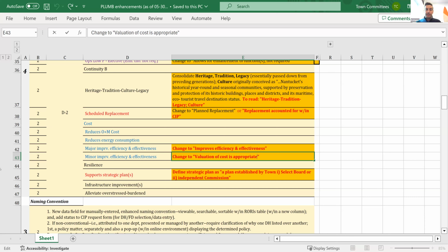The way this reads to me, and that we see issues with in a lot of requests, is essentially, is the estimate supported by documentation within the request? So are there quotes for the dump truck? Are there budgets for the construction? Sometimes we get very in-depth documentation that substantiates or supports what they're asking for. Sometimes we get a little bit, and sometimes we get a blank screen that says placeholder.